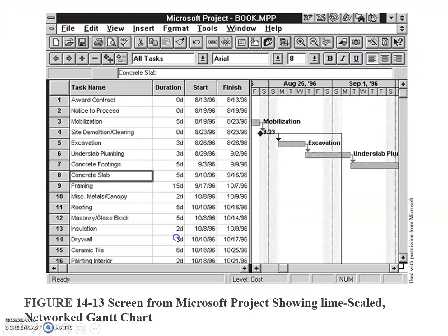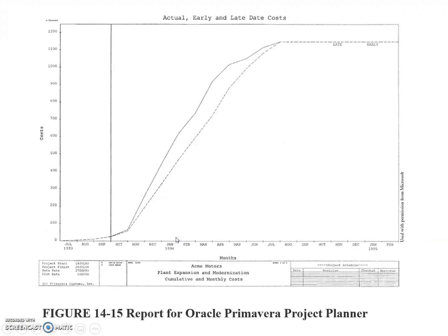Additionally, as cost based on activities is analyzed, summaries of costs will produce cash flow curves. As you can see in this figure, it illustrates a cost summary based on the scheduled activities, showing early and late curves of cost that can be quickly generated into analysis form using P6 software.